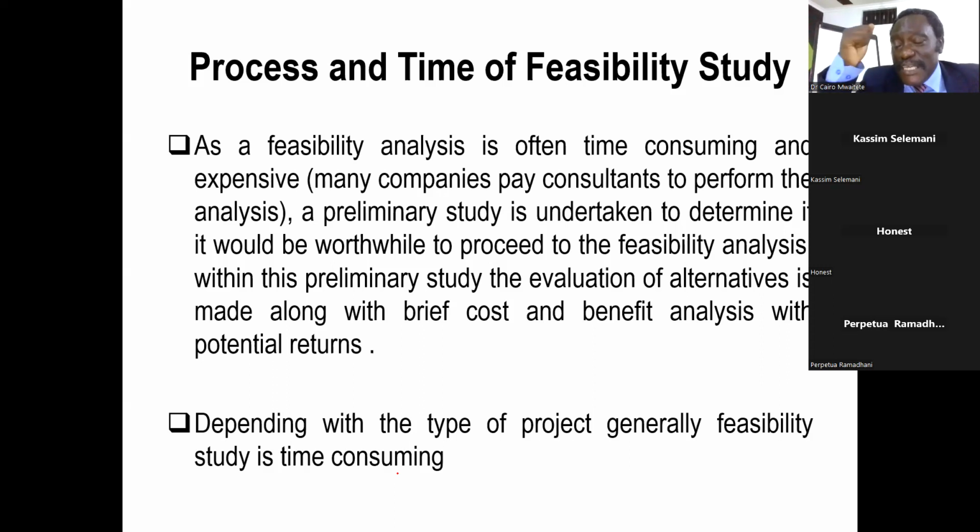But for bigger projects, especially those related to construction, road construction, building constructions, not less than 3 months, you'll have to produce a feasibility study. So it is about 3 months, it means 90 days. If you will be able to work 24 hours, you can realize proper documentation for a feasibility study related with construction, because it is time consuming producing those documentation.